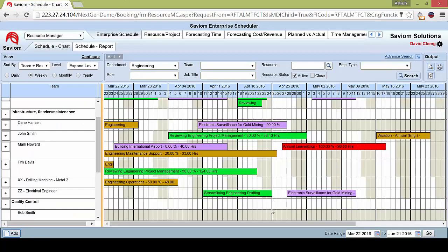As you can see, through this process, what I've shown you is I can allocate resources onto project-related activities and non-project-related activities, for example, the leave that I showed. You can juggle around and move your work to other resources and move a part of it onto a generic resource as well. It really shows you the flexibility of how your work can go from one resource onto another, and you can change the allocation levels of each of your resources.